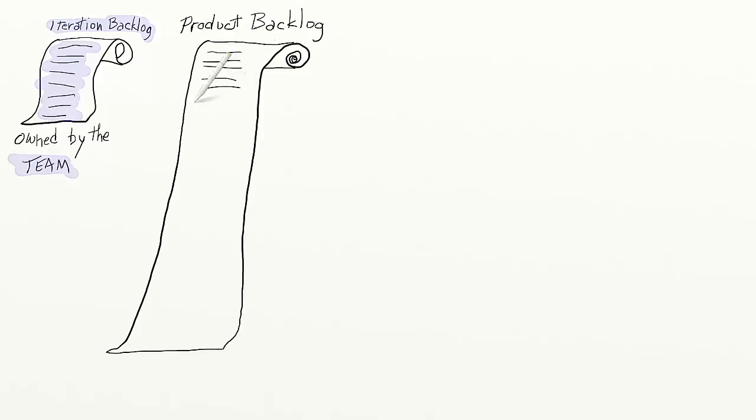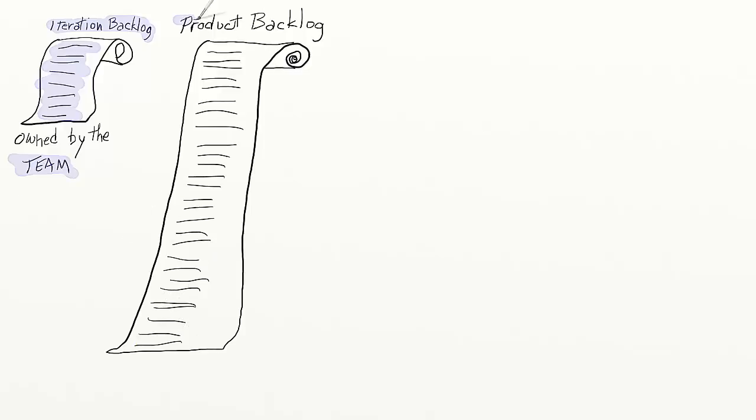The product backlog is a list of all the items, stories, and features for the entire product and can feed the work of more than one team. It is owned by the product owner. This list must always be sized and ordered by priority. Usually, teams find that keeping items at the feature level in a product backlog is easier to work with than a long list of small stories. Features are collections of related stories and are generally delivered together.